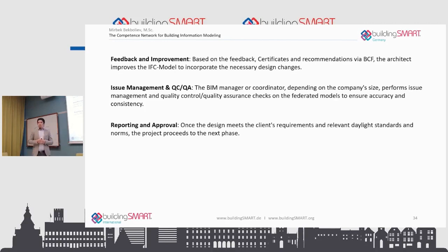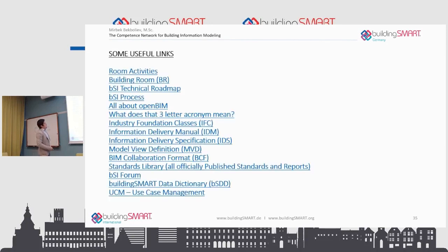So if you do it in issue management and track with BCF, you remember where you had the window cracks, what the status is, if it's still to be repaired or was repaired, when, and if someone repaired it, you can also tag the same person, same task. The task is done, completed, and still in your system. It's completely available. So with that message, I'm reaching the end.